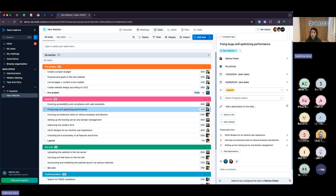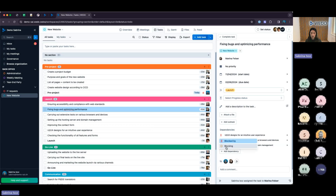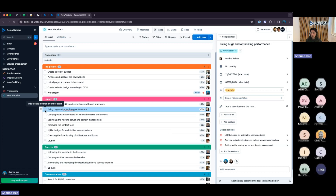If I choose these three tasks within the launch phase and add them as a dependency, it will show me that these tasks are blocked. With dependencies, if I try to complete 'fixing bugs and optimizing performance,' WeDo will automatically flag this and tell me there are various tasks depending on this, so I would need to complete those tasks first. I can also do this vice versa — not 'blocked by' but 'blocking.' All tasks that have dependencies are shown in the task detail list, and there is also an hourglass symbol before every task that has a dependency.